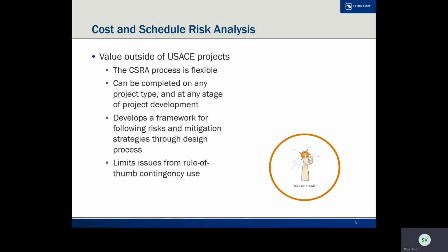Often the earlier the better, as the project development team would have more time to incorporate any mitigation strategies, which leads into the next point in that the CSRA process provides a framework for risk and mitigation strategies to be followed for the duration of the design process. The developed risk analysis should be a living document and should be regularly reviewed and updated as a project progresses. And hopefully your risk lessens as your project moves forward and as you effectively mitigate any potential risks.